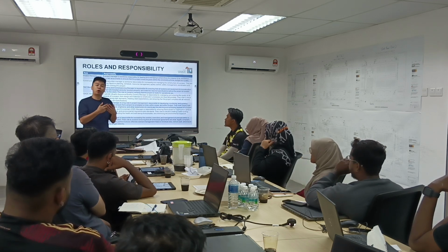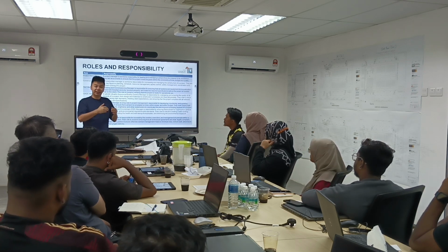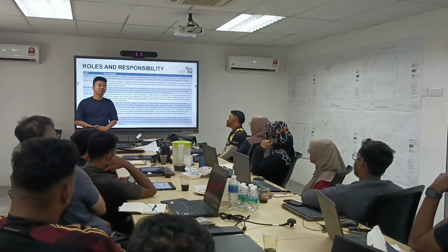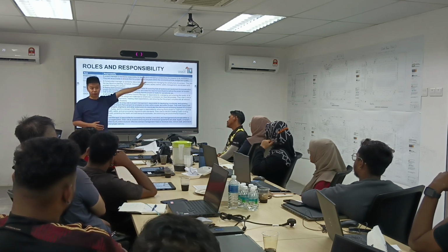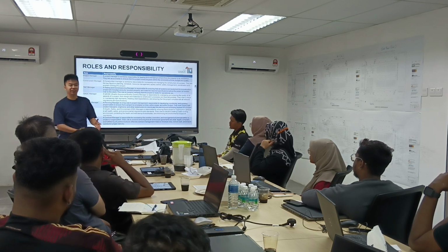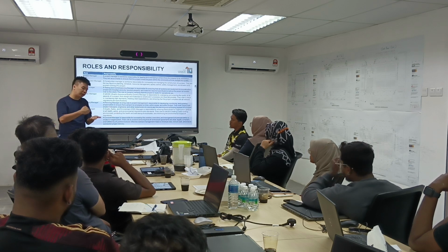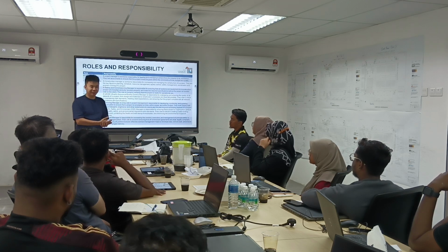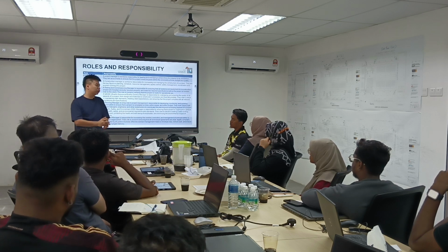Whenever there's a problem, a lot of our juniors or engineers choose, instead of solving the problem, to sweep the problem under the carpet and cover it. Okay, I don't want to talk about integrity issues or whatever. What I'm trying to say is the result of it. Let's say today, yes, I sweep the issue underneath the carpet. It looks like nothing happened. But I tell you what, when the project progresses to the end stage, when we start testing the project, especially the M&E system, there's no way you can run away from it. The moment we start testing, all these issues are exposed.